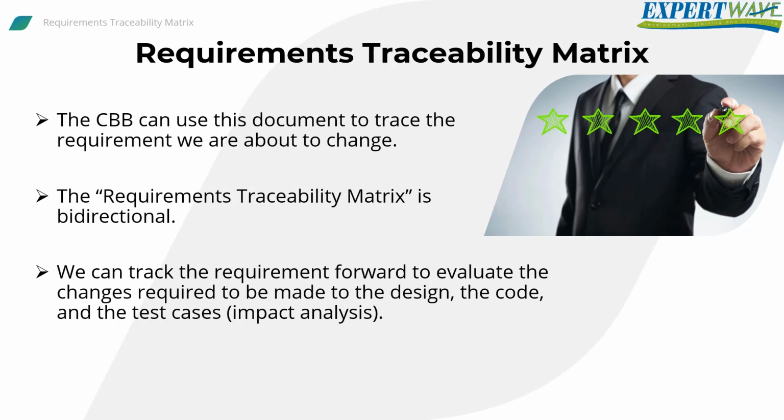Also, we can use that document to move backward. We can see what other requirements will be affected by our change and ensure that everything is included when we implement and test the change. This is called evaluating the impact analysis of the change.